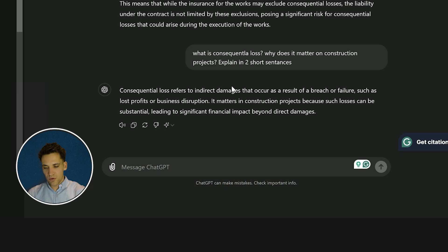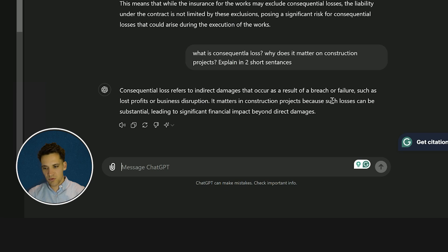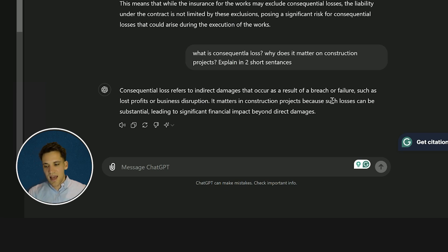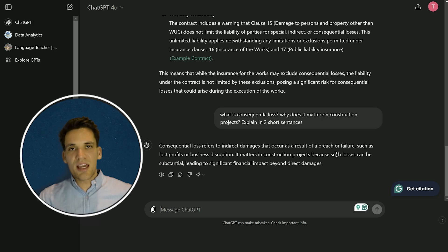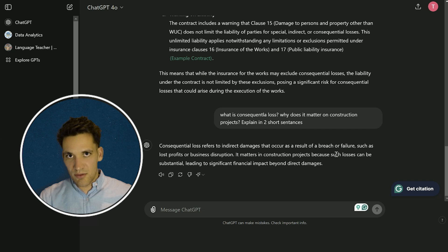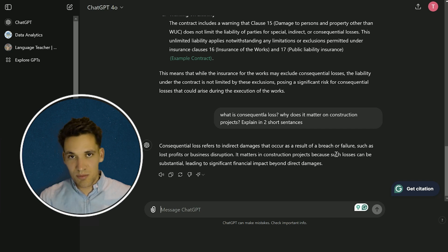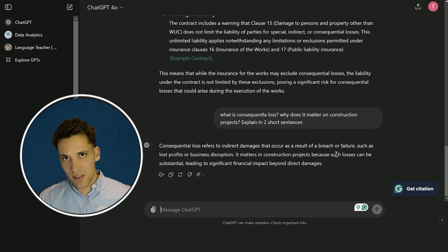Consequential loss refers to indirect damages that occur as a result of a breach or failure, such as lost profit or business disruption. It matters in construction projects because such losses can be substantial, leading to significant financial impacts beyond direct damages. So even if you don't really have a good understanding of construction contracts, ChatGPT can actually help explain and walk you through the process.